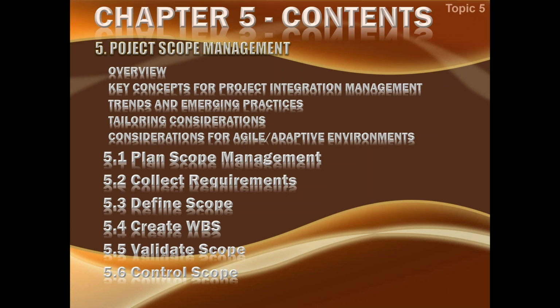So these three items, the scope statement, the WBS, and the WBS dictionary, actually form the scope baseline. That means the planning work of scope is complete. Now, moving over to monitoring and control, we have two processes there: Validate Scope and Control Scope. If you remember correctly,